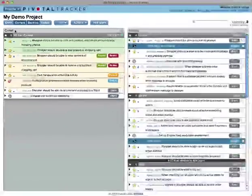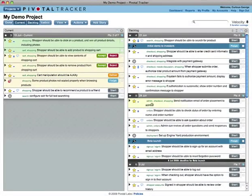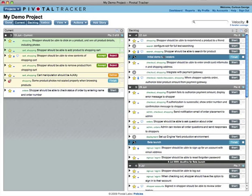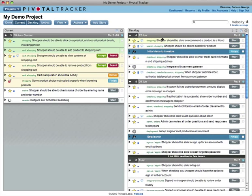Stories sometimes fall out of this panel or jump into it from the backlog. That's because Tracker dynamically allocates stories to current content based on what will fit.